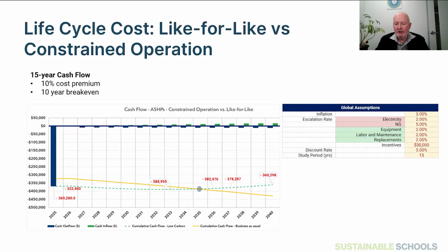So the simplistic world that energy efficiency has tended to occupy, a simple payback, just doesn't work when you're talking about major capital projects that have a life of 10, 15, 20, even 30 years. So get used to the idea of life cycle costing. When school boards are talking to your consulting engineers, make sure that this is what they're offering so you can look at options. Because if you look at that little box in the top right-hand corner there, everything there is highly variable. So inflation changes, the escalation of utilities.